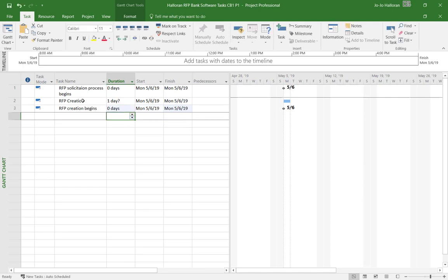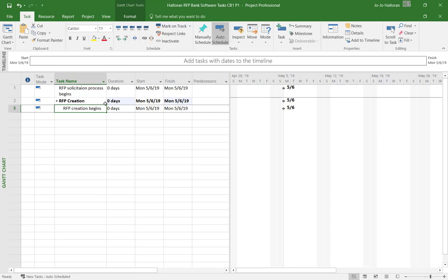And as we create this, we're going to do an indent on this one because it is falling under the RFP creation. So now you see that this changed to 0 days here because it's just the phase name or category name. So always be really careful about these indentions. And then the RFP creation begins, 0 days. That's our milestones. 0 days are always milestones.